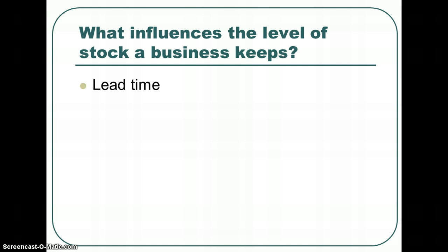We've got more. The lead time. Now, this will become more important shortly because the lead time is how long it takes between you ordering the goods and them turning up for you to use. Now, if it's coming through the post, you might be talking 2 or 3 days. If it's coming by courier, it could be a day. If you're doing regular orders, it might be that they're delivered every week. And the lead time is what it takes between the order and it being delivered. And that becomes more important when we talk about stock control.